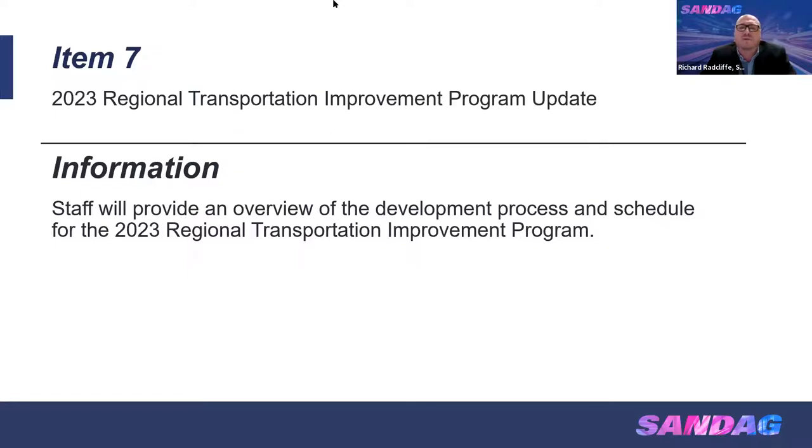The local agencies will basically determine or establish a need on their end. And they create projects in their CIPs, their capital improvement programs. And that's why I was saying at the local level, constituents will have an opportunity to comment on these potential projects. And they submit them basically to us and we review them, looking for whether the use of the funding is correct and appropriate, whether they are eligible under the Transnet ordinance.